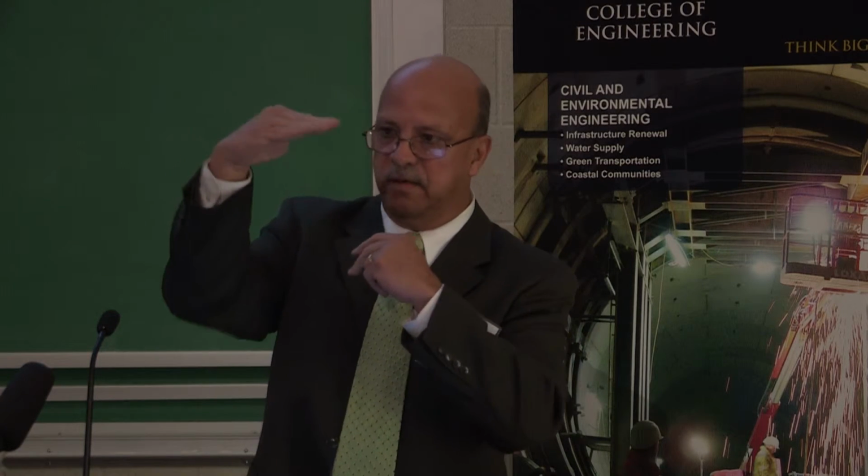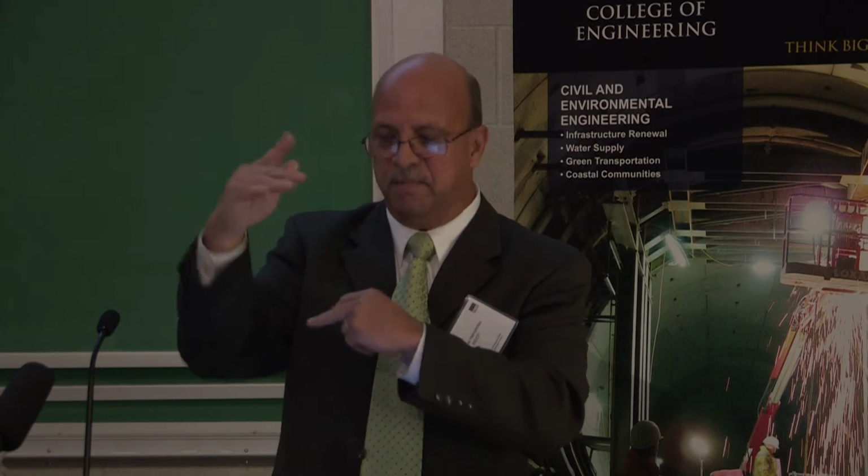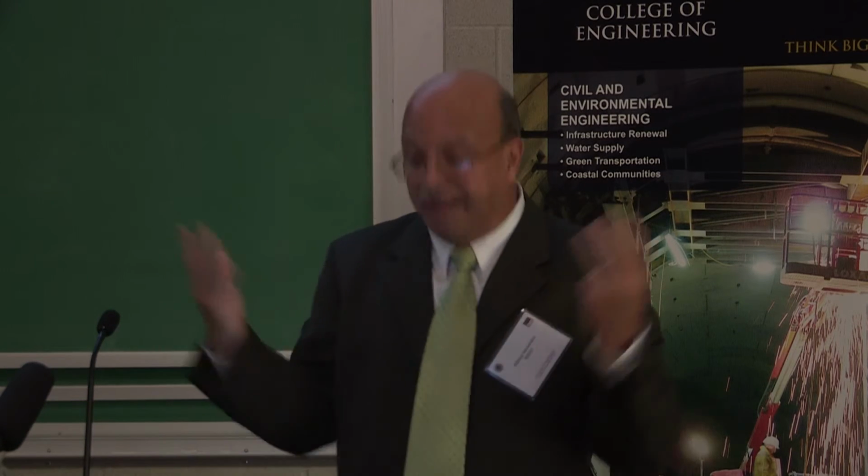And it was amazing, because it showed that our data compared to theirs was within control. It not only showed that we were within the established contractual limits, but statistically, at 95%, we were there. We were with them. And when things were going a little bit off, we saw it as well as they did. And through constant communication with QC, it all worked so well.